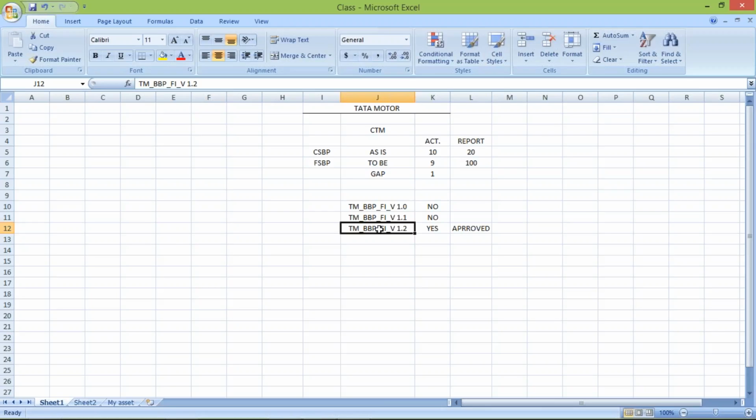So generally, this is informal. If you talk about the formal way, then the formal way means we have to prepare this blueprint, and once it is finalized by the client, we need to take sign off, a signature, and once we have taken the signature, it means the requirement got frozen, we cannot accept new requirements. Okay, these are the rules given by SAP.